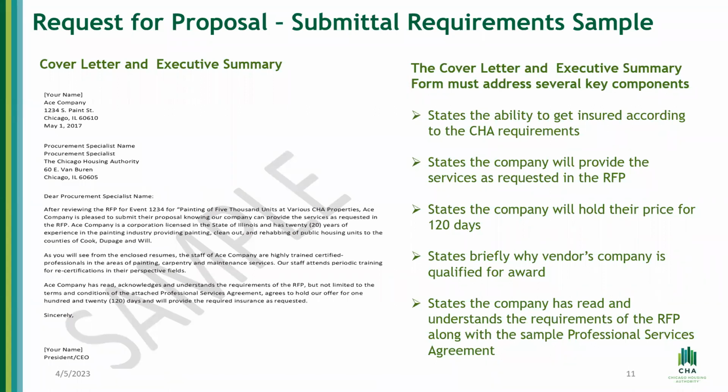In this letter, you should also note if there is a disagreement and offer a proposed change, okay? So you have to include if you have any disagreement, maybe with the scope of work. And the last part is that this letter has to be signed by the principal and the joint venture, if you have a joint venture.